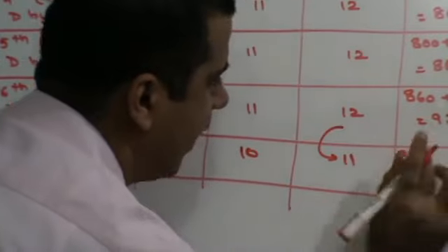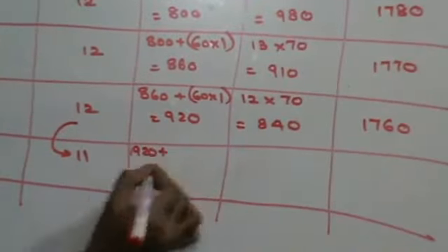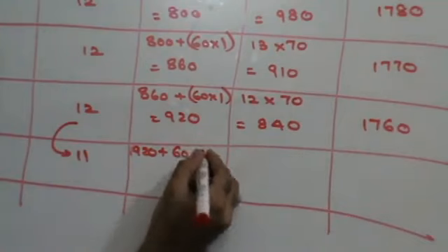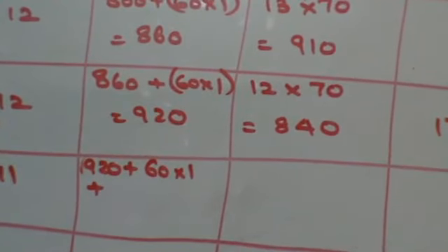I have already spent 920. The cost of crashing D is 60 rupees per day. And in order to keep AD as my critical path, I have to crash BEF. So I have to crash now in B, E and F.